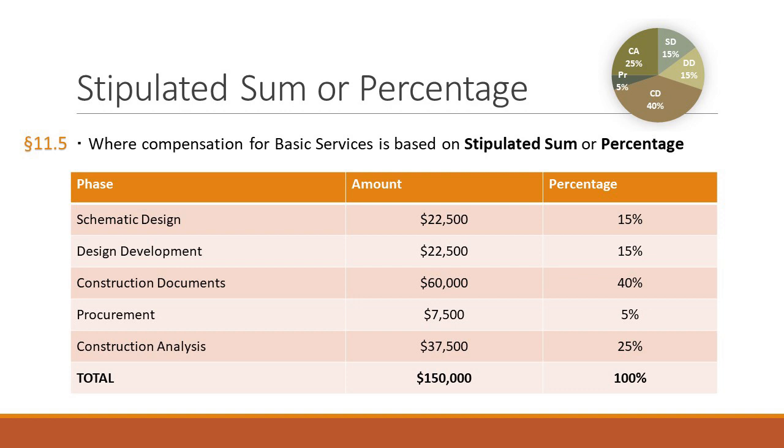Well, that owner's approval in writing that we talked about way back in Article 3.3 or 3.2, whatever it is, once that approval in writing comes, that triggers that you get paid at this percentage, your $15,000, your 10% of the $150,000. So they're hand in glove. The architect wants approval to know that they can start working on the next phase. The architect also wants approval to know that that's when they get paid. Make sense? Okay.